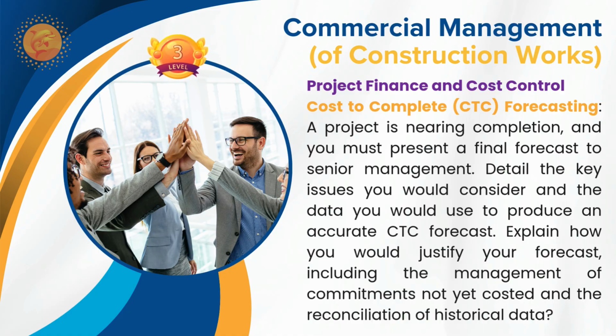Maybe you want to keep it until the end of the project, or if you didn't utilize it, maybe the relevant risk occurring chances have been already avoided, then those portions can be transferred back to your profit, or you may utilize it for some other improvements within the project. So those kind of adjustments you can do and make sure what is the remaining contingency allowance you are going to keep for the remaining duration.